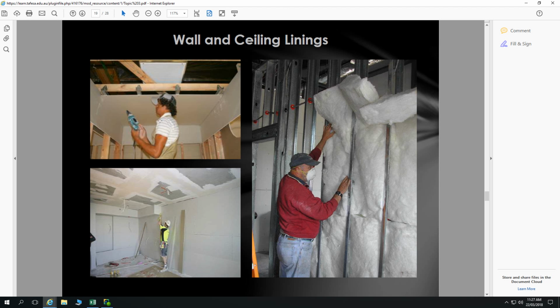Also, there's a process, or a stage, that we haven't covered here, which is incorporated within our timber framing: we get our windows in. Our windows have to happen with our timber frame. In some forms of construction, they will happen later, but to keep it simple, for all intents and purposes, our windows go in at our framing stage.